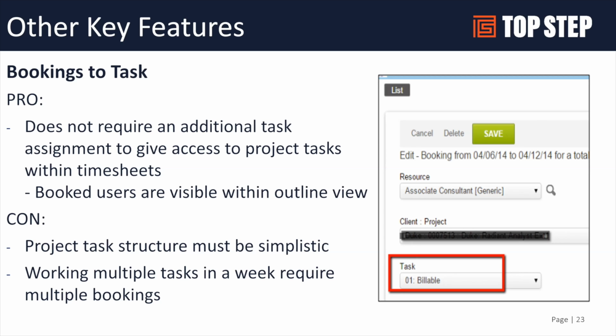What that does is give you the ability to no longer have to go back into the project and then assign to the task. So it allows you to use booking to the task as the task assignment, by allowing the end user to put time to the task. If you've got a resource management approach to PM, then by having them book to a task, it's saving them a step of having to go back into their project.